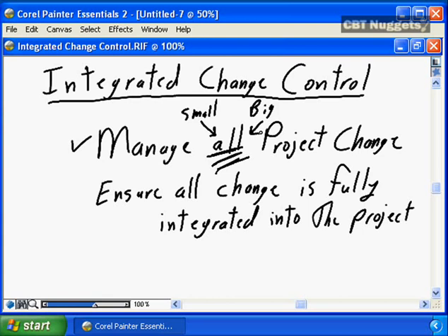If you have to change the color and the color has been approved and signed off, you must go through change control. If you have to add functionality that is not in the original scope, you need to go through change control. If you want to change anything that has been pre-approved on the project, it needs to go through change control. We need to have proper processes.